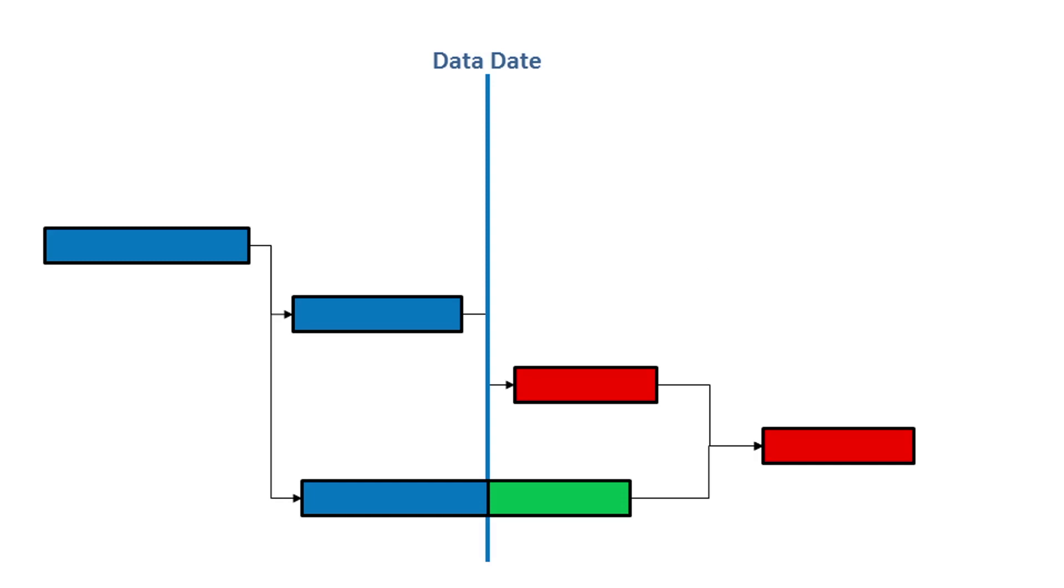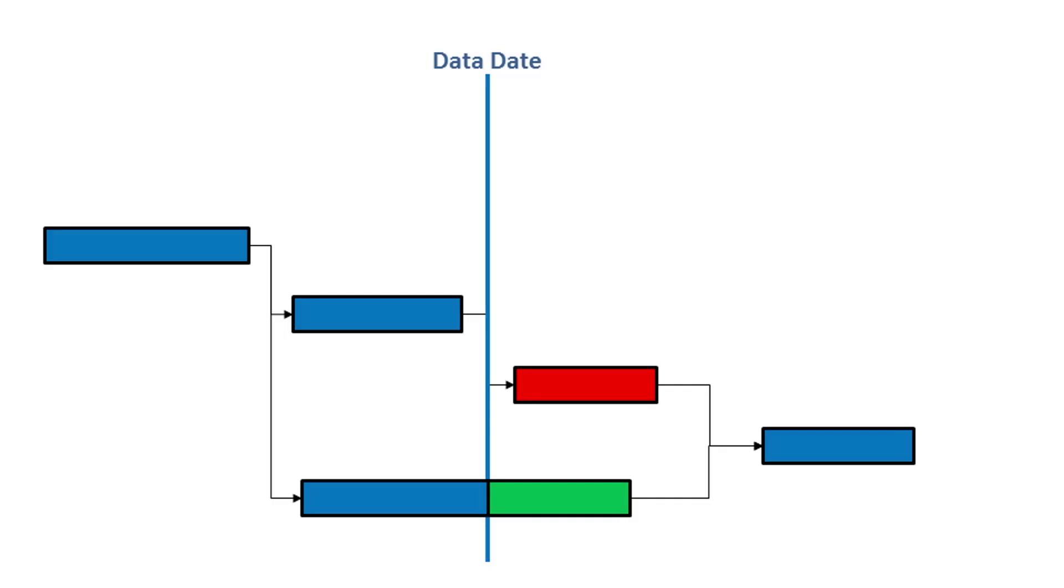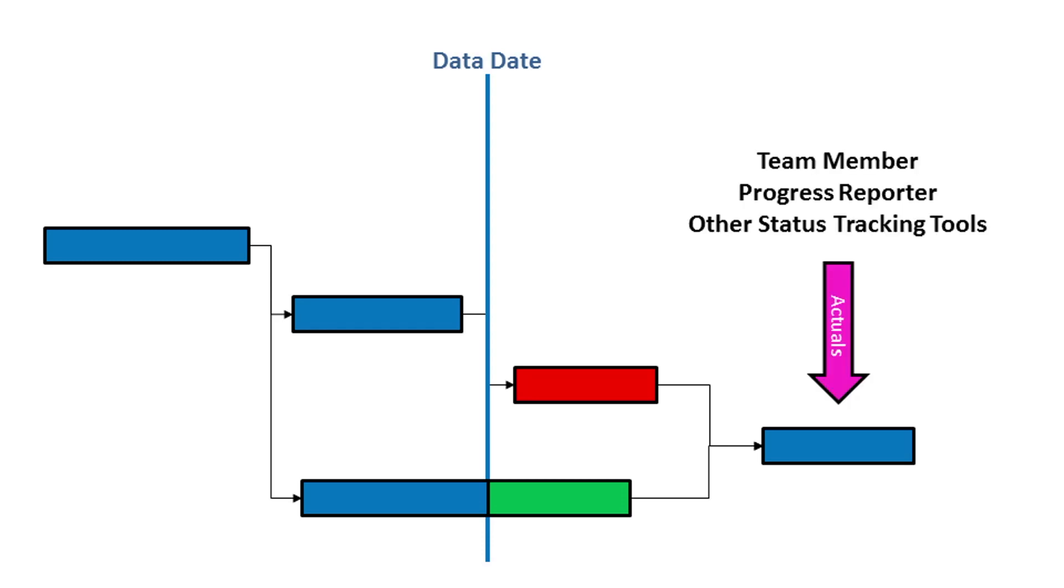Invalid actual dates are present when an activity is reporting an actual start date that is in the future. This can happen when an actual date has been entered manually and incorrectly by the scheduler. If the Primavera progress reporter or team member tools are in use with the system, these can also be a source of invalid actual start or finish dates in the schedule.